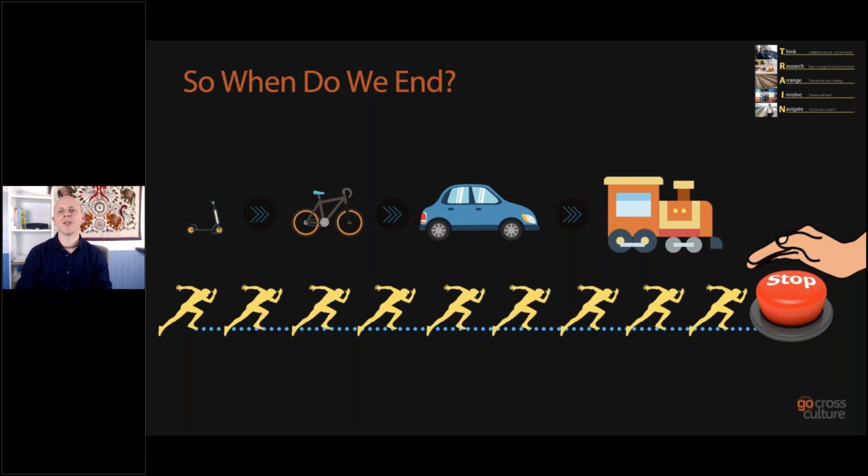Then the next question you're going to be asking is, okay, I've done 1 sprint. How many sprints will it take to get to the goal? And this is where it's different. Waterfall would have specified all of this up front. We sat down with the product owner and said, okay, we're going to do requirements documents, it's going to take 1 month. It's going to take 2 months to do a design. It's going to take 3 months to do a build. It's going to take 1 month to test all of that. So there's a 6-month process there. We commit that to the sponsor. We start tracking that date.